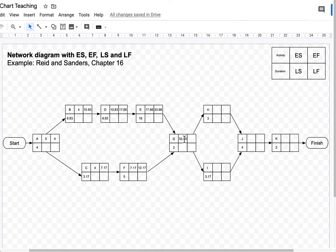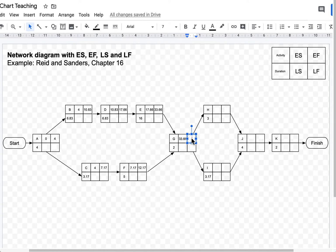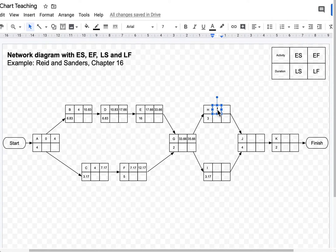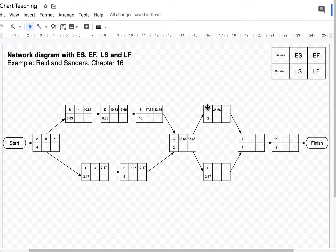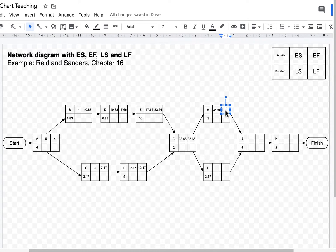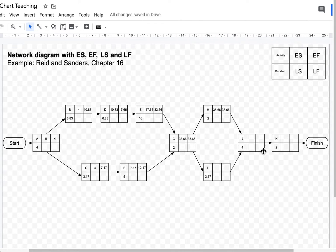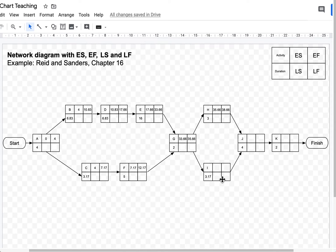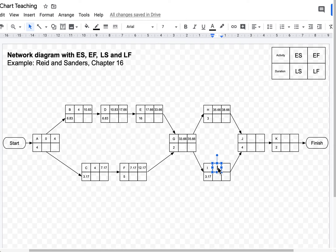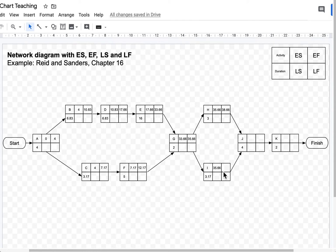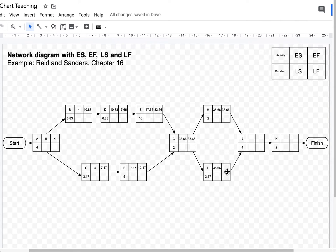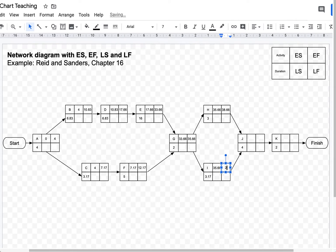33.66 plus 2, that's 35.66. Activity H can start in 35.66. Before I move on to activity J, I first have to finish activity I. So moving on to activity I. Activity I can start on 35.66. And the earliest finish time for activity I would be 35.66 plus 3.17, which is 38.83.